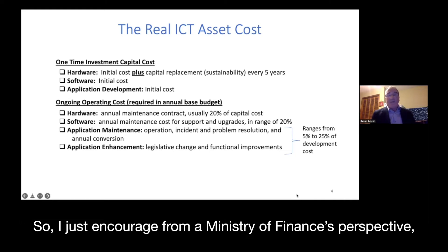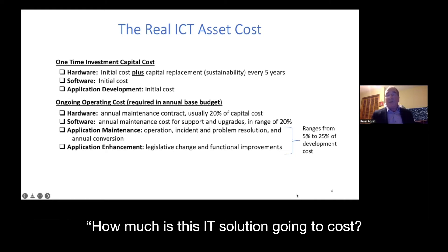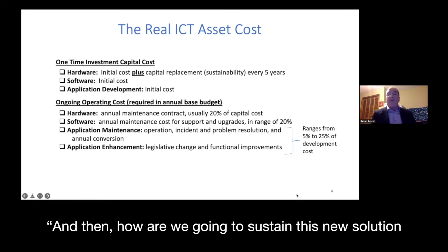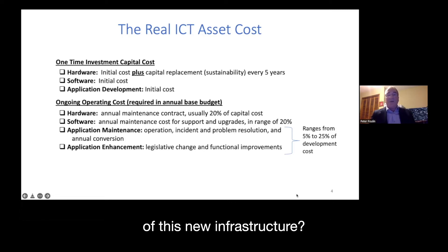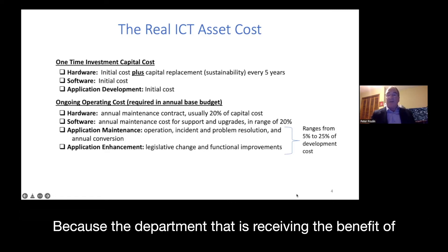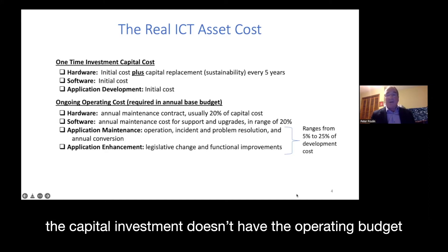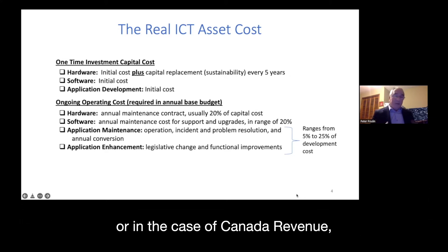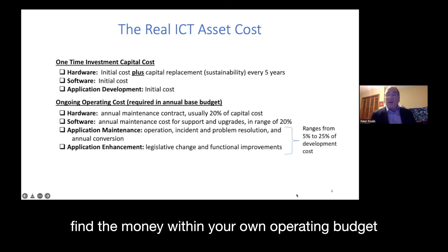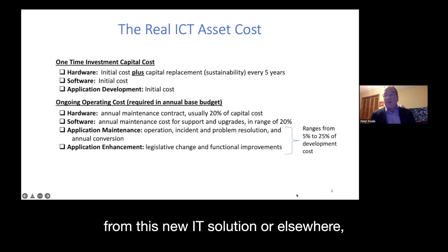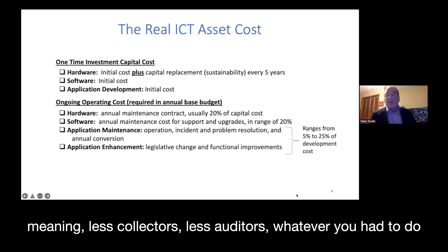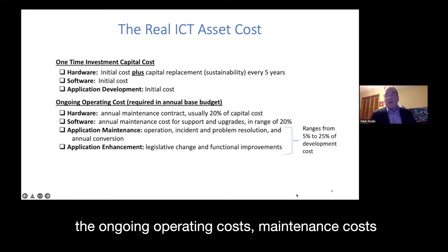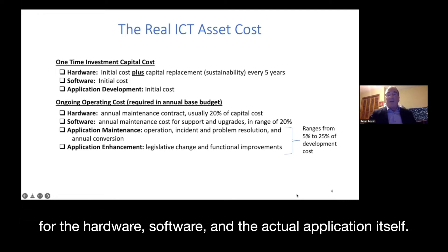From a Ministry of Finance perspective, you can't just ask how much this IT solution will cost and find the money. You have to ask: how are we going to sustain this new solution or infrastructure, and where is the money coming from? The department receiving the capital investment benefit doesn't have the operating budget to sustain it unless the Ministry of Finance increases its operating budget. In Canada Revenue, we were told to find the money within our own operating budget — through efficiencies gained from the new IT solution — meaning fewer collectors, fewer auditors, reallocating resources to cover ongoing operating and maintenance costs.